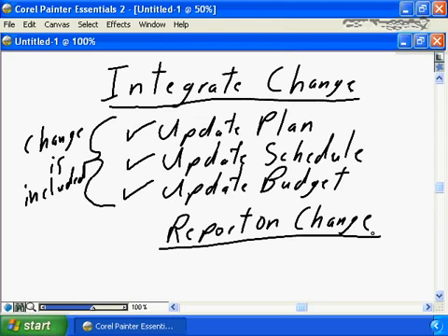In your next status report, your next weekly status report, your next monthly status report, you need to inform all the project stakeholders that on today's date, we integrated a new change. This new change resulted in a 3-day schedule change, and this new change resulted in a $5,000 increase to the project budget. We're not talking project overruns. We're not talking that the project is delivering 3 days late. We're not talking that the project is delivering 3 days over budget.